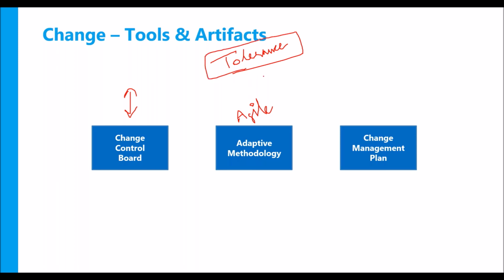Okay, let's say your project was budgeted for 1 million US dollars. Now you can put in a tolerance level saying my project budget is 1 million US dollars, but I can tolerate an additional 10,000 or additional $100,000 of additional effort coming my way. Now you can plan your project this way. So if ever your stakeholders or customers are coming with changes, you can prioritize these changes and see what can fit into this $100,000. Okay.